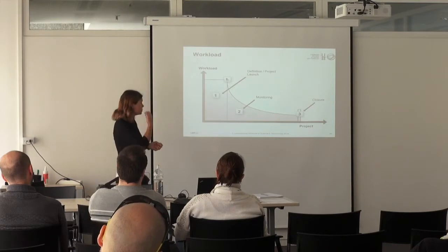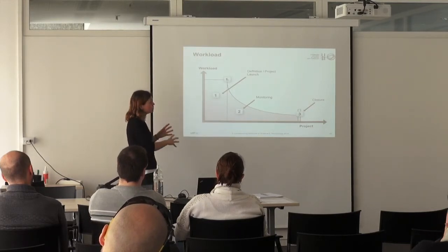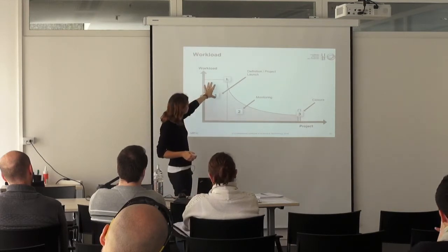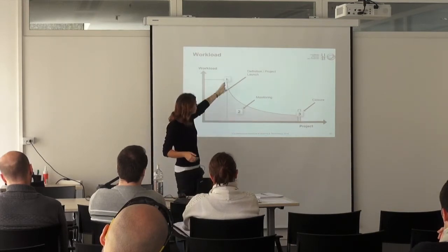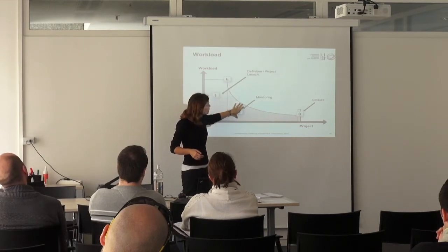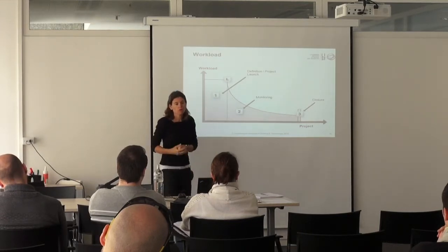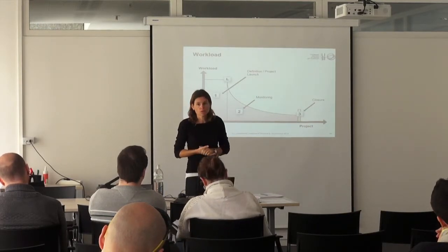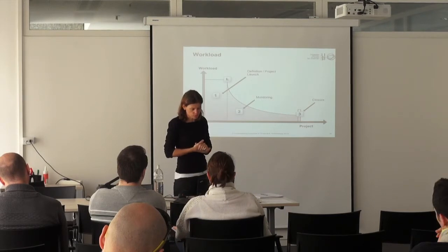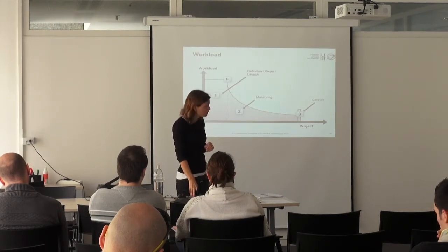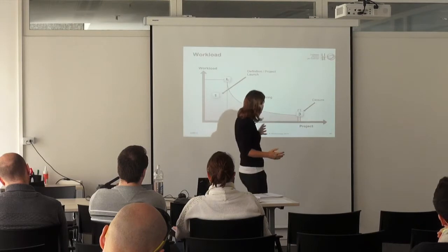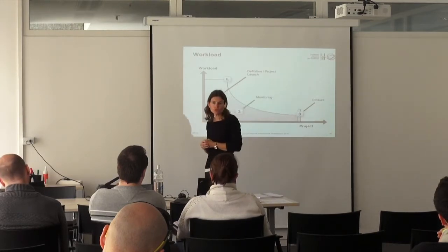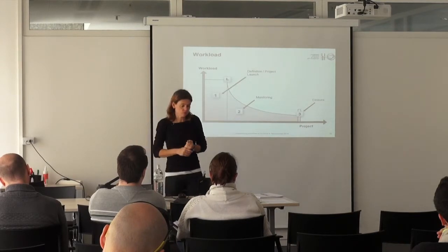So at the end, as you've understood, the workload necessary on risk management is really at the beginning when you define the project, when you launch it, and then it decreases along the project. So by the end of the project, less risk, less risk management, and normally a little bit more by the end of the project at the closure, so that you have some capitalization.